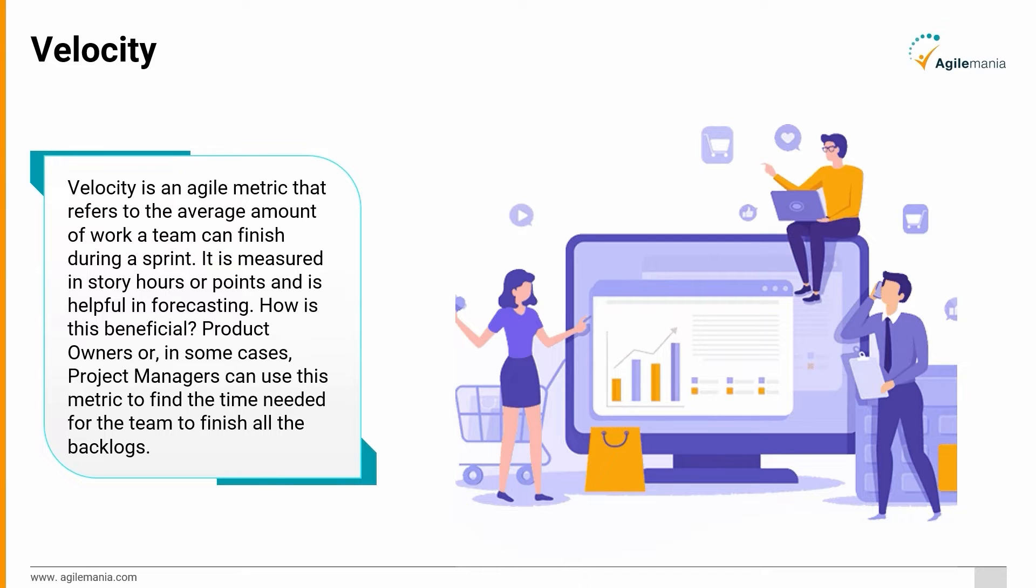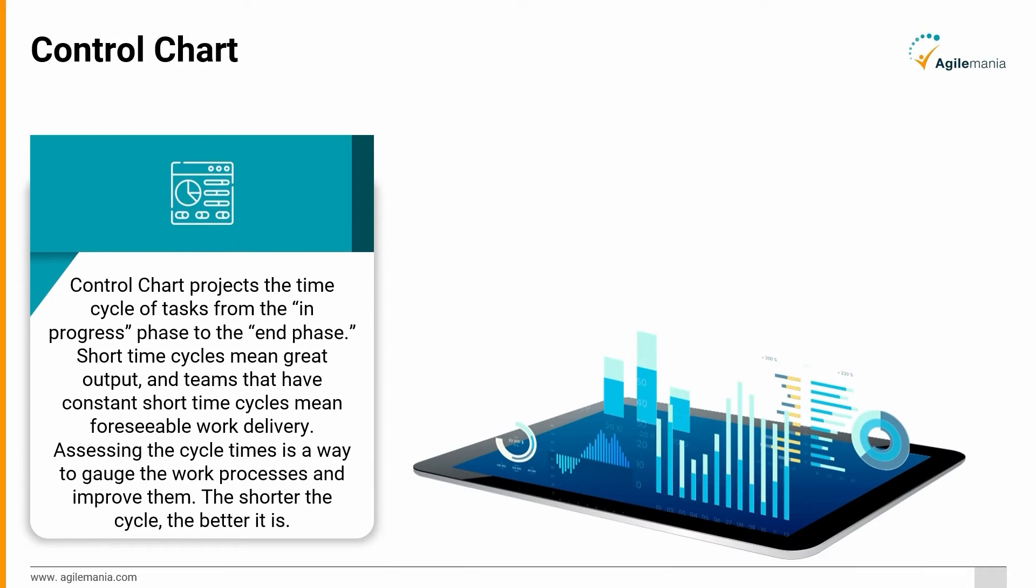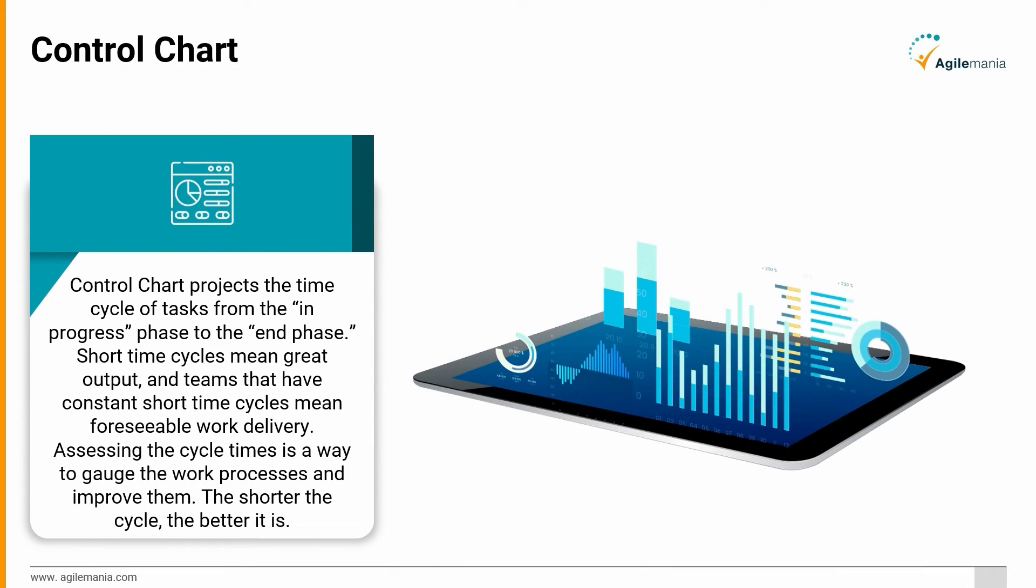Control Chart: Control chart projects the time cycle of tasks from the in-progress phase to the end phase. Short time cycles mean great output, and teams that have constant short time cycles mean foreseeable work delivery. Assessing the cycle times is a way to gauge the work processes and improve them. The shorter the cycle, the better it is.